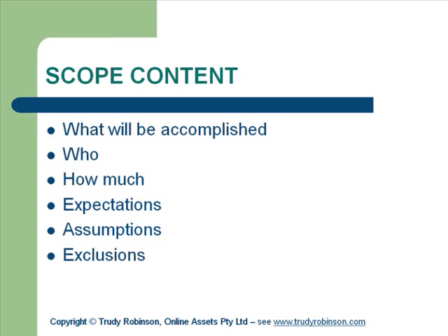So if you can imagine, one of the projects I worked in was a takeover, and they had gone through all the assets that will be taken over from one company to another. They did not exclude software. So when one company took over the other company, the presumption was that all the software that that company owned was part of the asset and that they would get that as well, and that was a load of money.